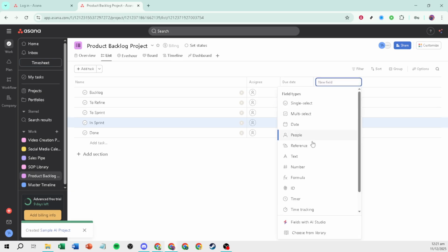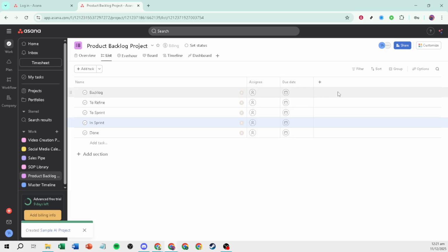Manage during the sprint by moving cards across sections, assigning owners and due dates, and keeping descriptions and checklists up to date. Set rules to automatically move tasks when fields change, like advancing the scrum stage or marking a task complete, so the board stays accurate with less manual effort. Use the sprint board daily to review progress, call out blockers, and plan the day's work.